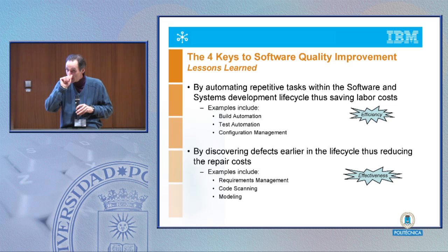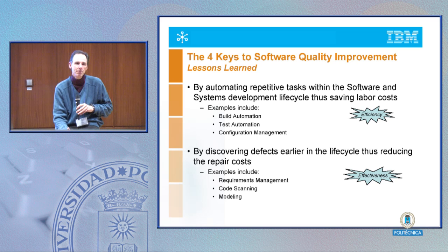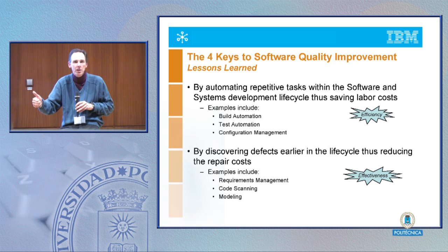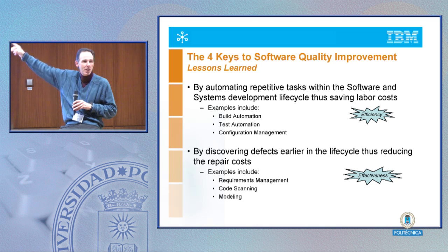The first thing you could say is, where will you see the most benefit most quickly? The back end of the life cycle. Start on test. Start on the quality areas. Put some automated regression testing in place. Help your people manage their test lab equipment more effectively, so they spend less time looking for which machine to run these tests on. You can quickly put improvements in place in those areas, and you'll see the benefit within weeks, because the time from putting those improvements into place versus something being delivered is usually quite short, and you can measure the difference: fewer calls on your hotline, higher quality, lower defect rates. Those are really important to organizations, so you can see the improvements very quickly. So automation becomes the first thing that you could focus on.